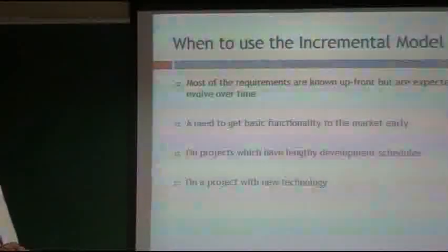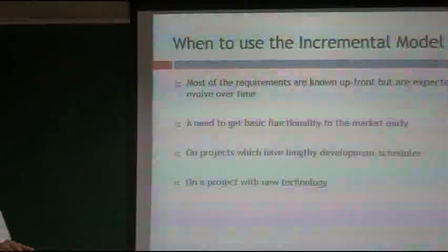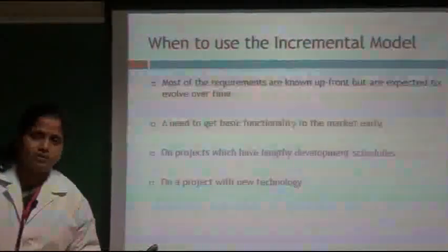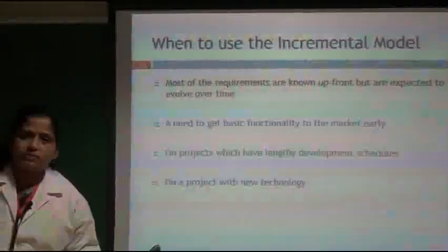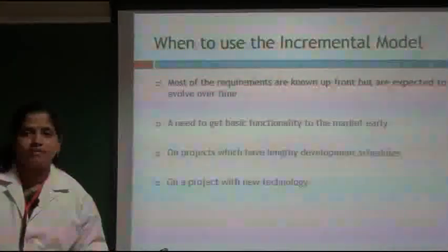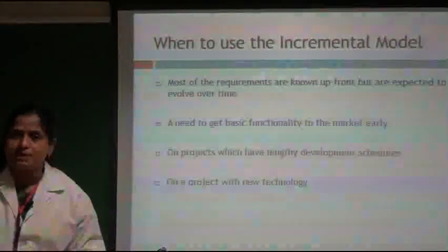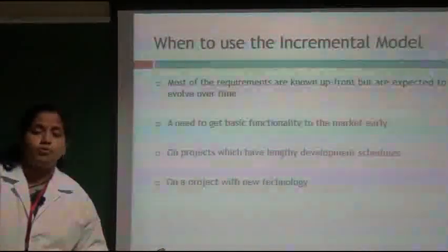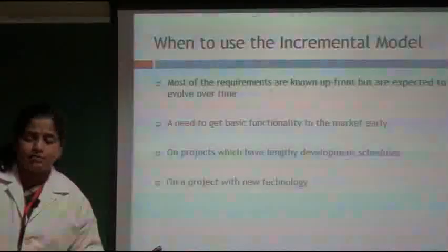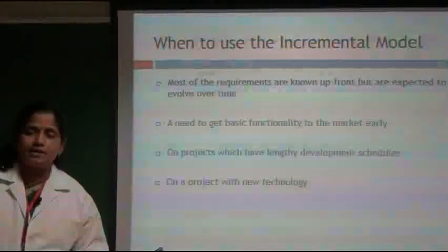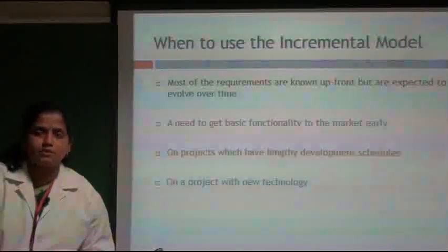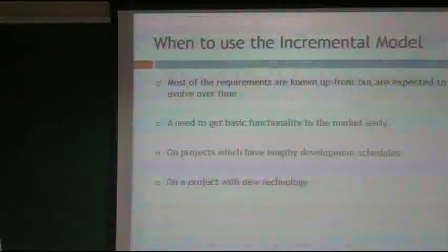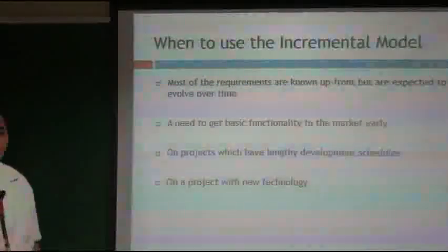Also on projects which have lengthy development schedules, and projects with new technology. See, any project which has a lengthy development schedule, like four or five years. If a person sits quietly for five years and then releases a project, it is very difficult to realize the output of that project. So in that case, if we go for incremental, every year something will come periodically, so that our customers get used to the product and to the new technology.